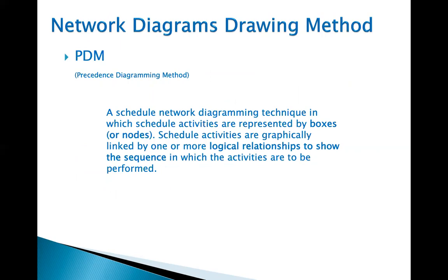I would like to provide some definitions before we move to the example, to the exercise. The first concept that I would like to present is the PDM. The PDM is a scheduling technique. It's the schedule network diagramming technique, in which the activities are represented by boxes or nodes.